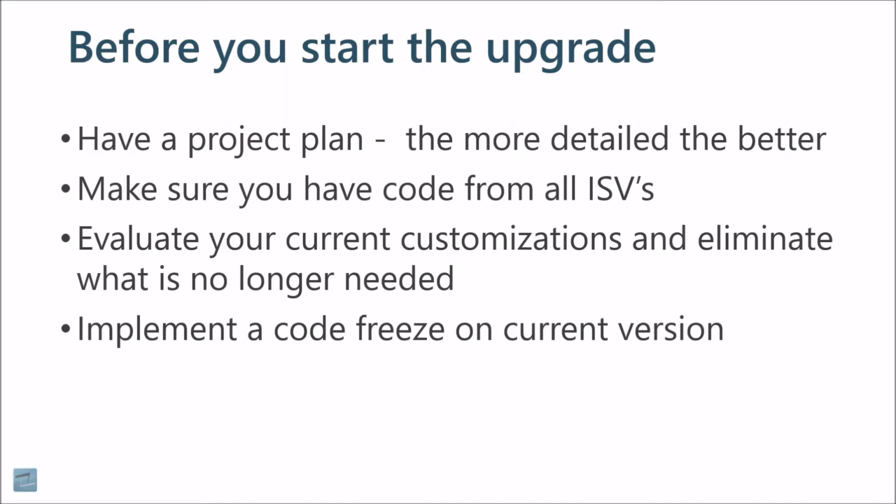But David, probably even more than me, can tell you the problems that you can run into when you start adding code into your 2012 when you've already started the code upgrade, especially if you're going to make new objects or change tables, because of IDs. It can be very complicated and cause us some issues. So it is best, if possible, to set a code freeze date and then stick with that.